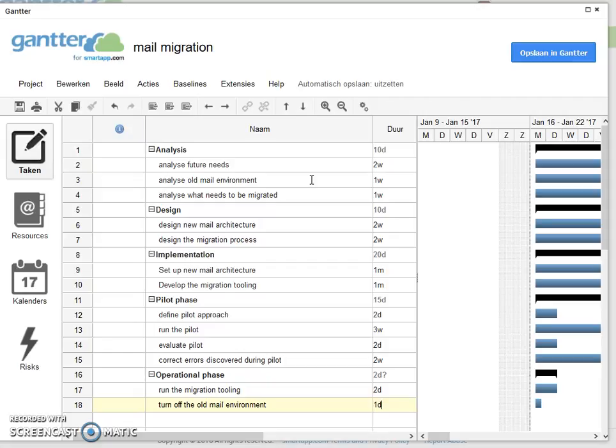There are some points in the work breakdown which should actually contain a critical step where the customer formally confirms he's okay with what you did. We should insert those. Those critical steps are called milestones in project management. A fairly typical one in almost every project is the one just after the design, when your design is available. It's from a contractual perspective very important that the customer signs off your design.